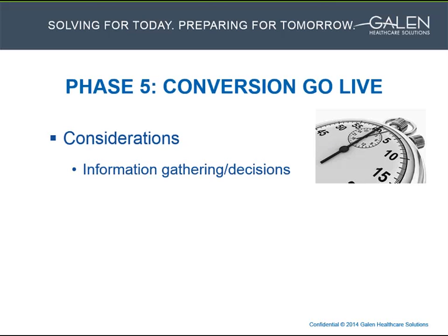Sometimes during data mapping, peculiarities, let's say, with data from the source system are uncovered by the tech team. These items are usually brought forth in the weekly status calls, and then any decisions made by the conversion team over how to convert the data. These decisions will need to be tracked and have the potential for having a significant impact on the go-live, actually.